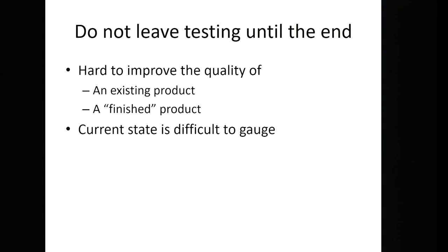We run the tests, and the tests are failing somewhere. Well, we know we've not finished, so that's great. It's good to know. And we can then see which tasks haven't been done because we're sure that all the other tasks have tests. So if we have a failing test, then hopefully it's just in one place, and we can then get that fixed. Then the tests pass, and we know that all the tasks on the backlog have been finished.